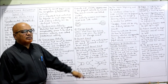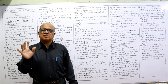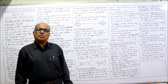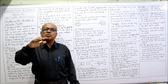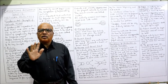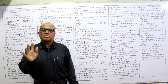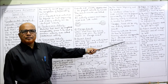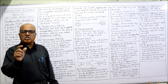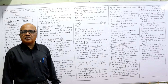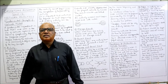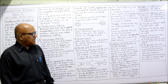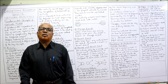The rule is: between two events there should always be only one activity. To resolve the problem of concurrent activities, we introduce the dummy activity. Dummy activity consumes no time and resource — it is introduced only to overcome this situation. The dummy activity is shown in the network diagram by a dashed arrow. Whenever a dashed arrow is seen, it is understood to be a dummy activity.